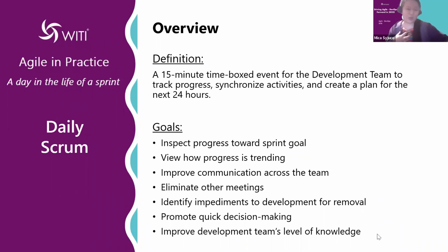So you say, okay, what did I do yesterday to help with that sprint goal? Maybe I coded this, maybe I tested this, etc. So we talk about that quickly. And then what am I going to do today, right? I'm going to continue with this, or I'm going to start doing this. And then do you have any impediments, anything that's in your way, right? So you talk about that. Start with those 3 basic questions to get it going, right?